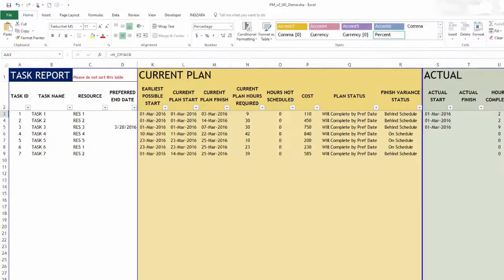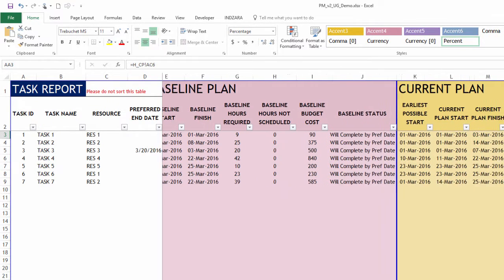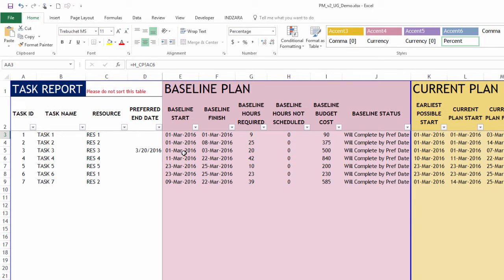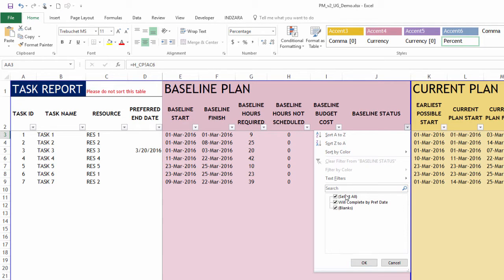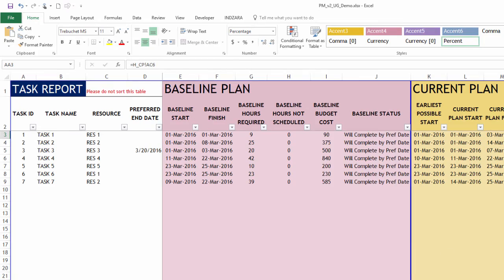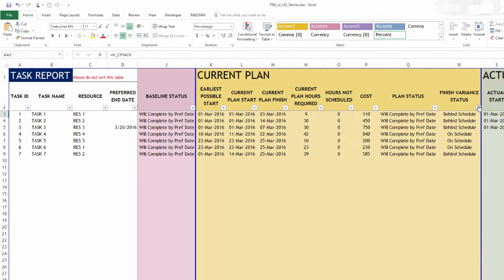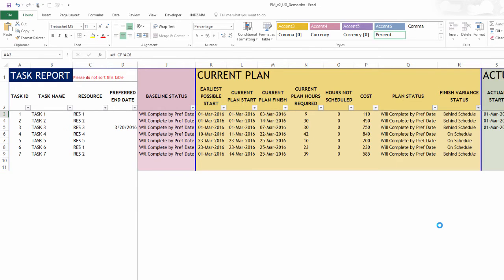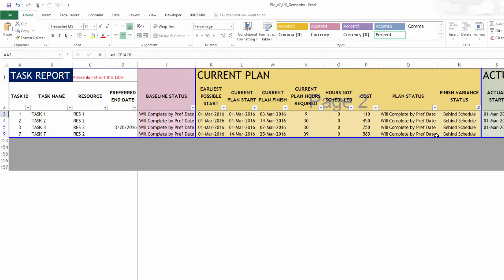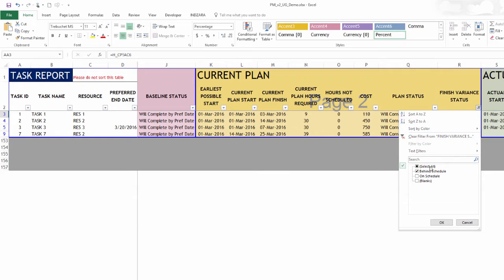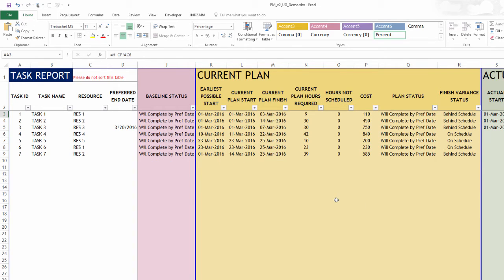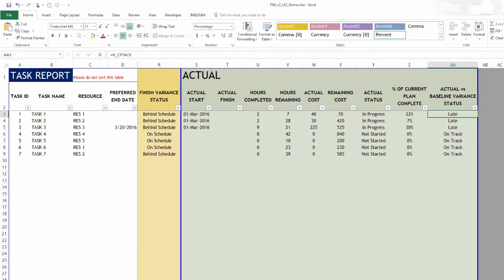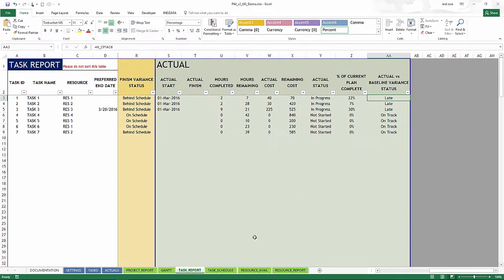The task report is where you will see detailed information about each task. The template can handle up to 150 tasks. And you will see all the details for every one of those tasks. And it's also interactive. So you can basically go and say, tell me only the task which will complete by the date that I preferred. Or in this case, tell me which tasks are behind schedule, which is comparison between the current plan versus baseline, which ones are behind schedule. So I can just select that and I will see only those tasks. So this is how easy it is to get a complete understanding of where we are at the task level. So this report also has actual tracking. So what percentage of the current plan is complete and a lot more.